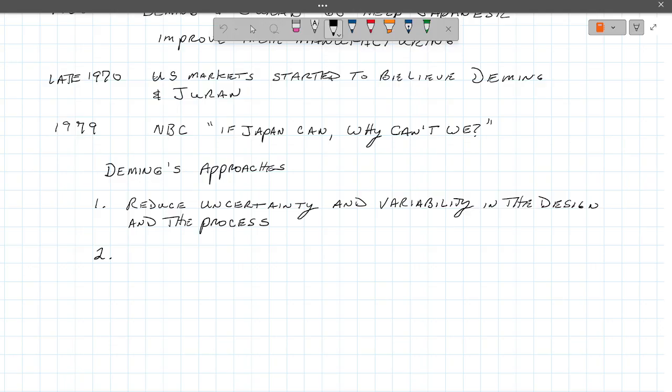It's the same thing if you take a look at, well, let's say we're going to build the dorms down here. 1960, I think they were built in '67. So we want to make sure Smith is the same as Heritage. How do we do that? Well, we want to train the people that work here to go down there and do the same thing. So we're not going to build four crews to build dorms. We're going to build one crew, train them to go build another one, take some of those and have them build the next couple.